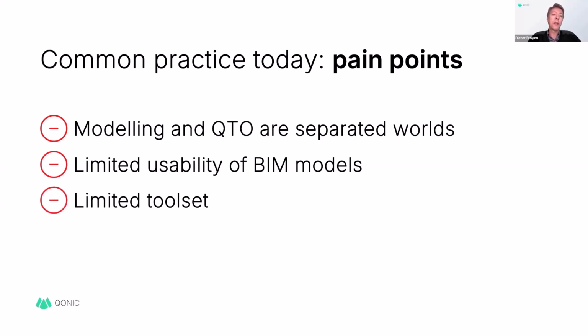Then we can say that there is a limited toolset available in the software applications. You can almost always count elements, calculate the length, the area, and the volume, but in our industry, we need a lot more than that. For example, what if you want to count the number of steps of a stair, or if you want to calculate the length of a handrail?